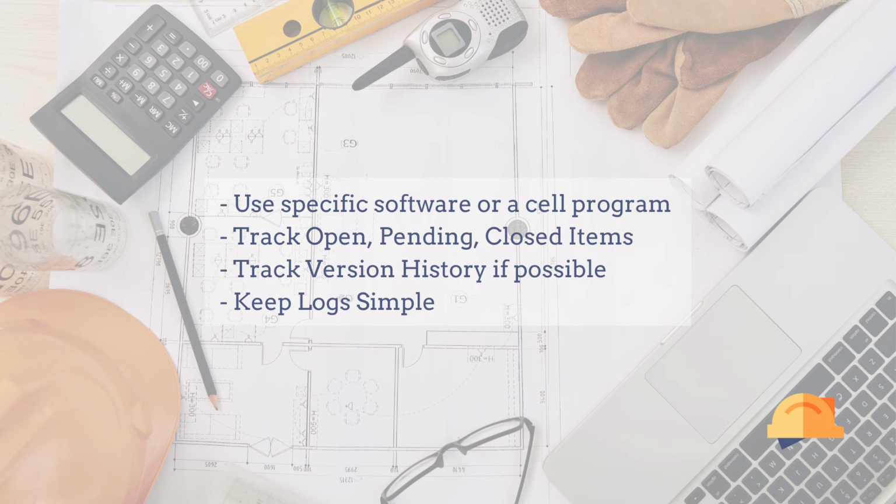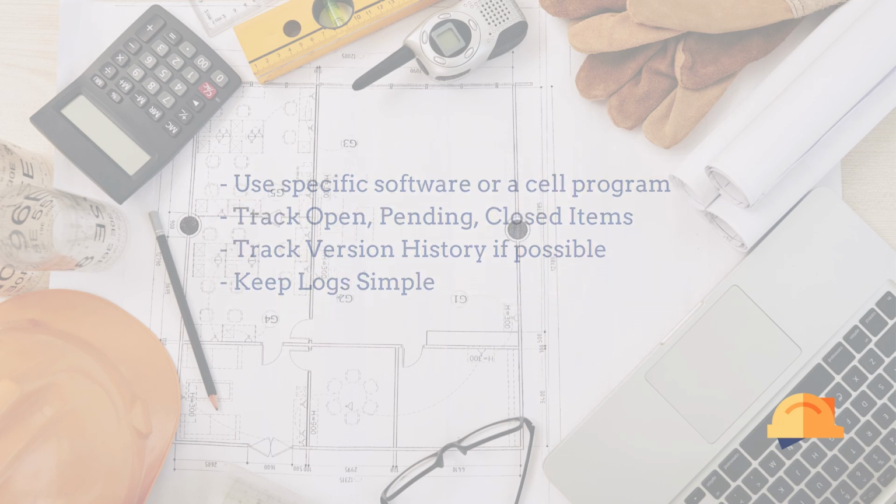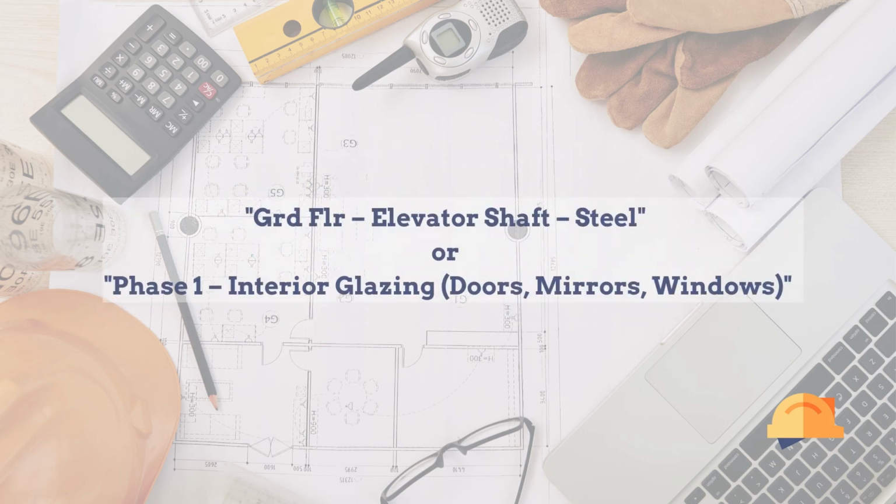Keep the logs very simple. Provide descriptions that are concise and clear. For example: ground floor, elevator shaft, steel; or Phase 1 interior glazing, doors, mirrors, windows. The area, the scope, and the components are noted, and the title is simple enough for anyone to understand.